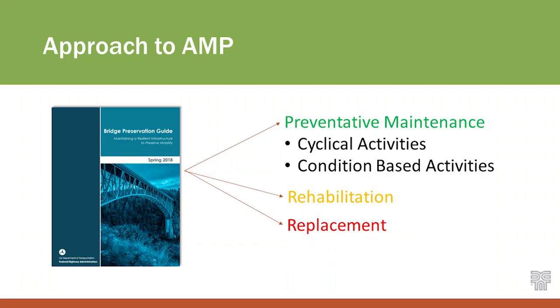In the FHWA Bridge Preservation Guide, they categorize different actions for preservation: preventative maintenance, rehabilitation, and replacement. Within preventative maintenance, there are cyclical activities — essentially cleaning the bridge, sweeping — activities that DOT maintenance can perform themselves. Condition-based activities are more involved: deck patching, deck repairs, painting, joints, overlays, et cetera. A step further is rehabilitation: full or partial deck replacement, pier strengthening, member strengthening, and so on. And then the red is when you need to replace the bridge. We looked at all of these for the Moyet Bridge.